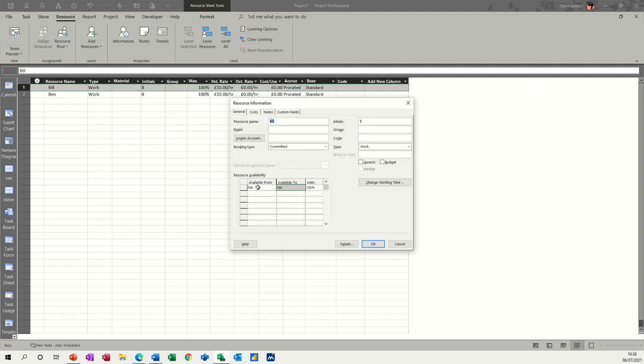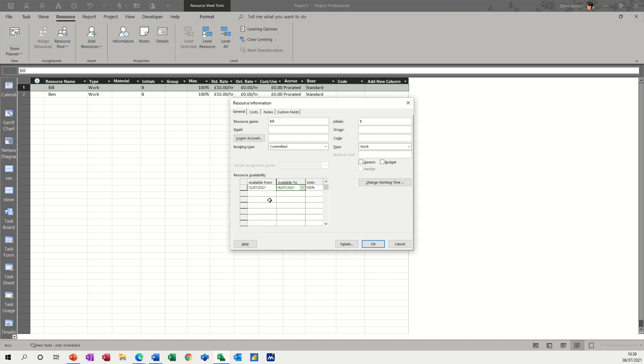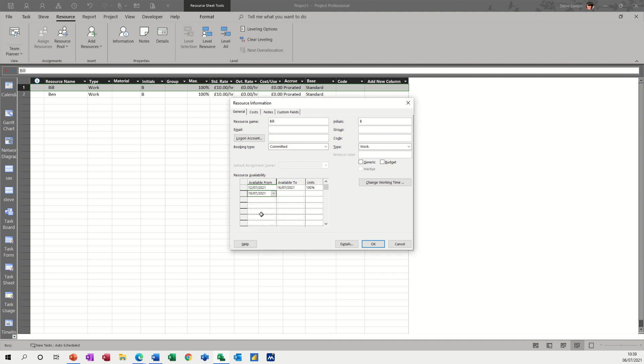So whether you change the actual availability, so you can do this, if I could say he's available from the 12th, and he's only available for that week. So the 12th, and he's available to the Friday, and then after that he's not available until the 19th. And then thereafter, just put an A after that, he's available. So basically he's available from the 12th, but not the 6th. And he's available from the 19th onwards.